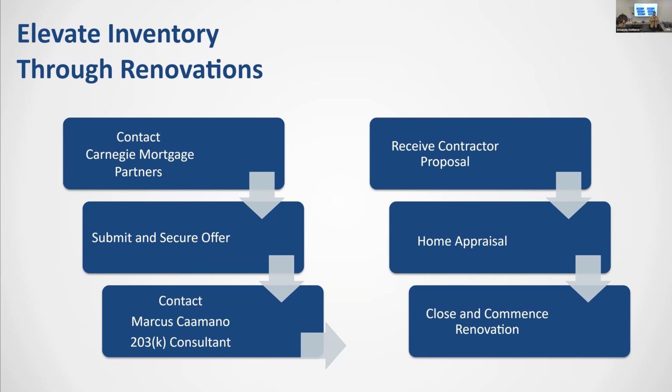They're familiar with the process, they go through it. But typically, what you can do is the mortgage company is going to be able to tell you, acquisition is here, the max they're approved is here, that's how much you have for construction. So you're taking that analysis and saying, okay, let's do 30,000 a kitchen, 15,000 a bath. You want to do the floors, you want to move a beam, whatever it may be, and you get a general idea of it. As long as the home after construction looks like the higher priced homes in the area, then you know it's going to appraise.